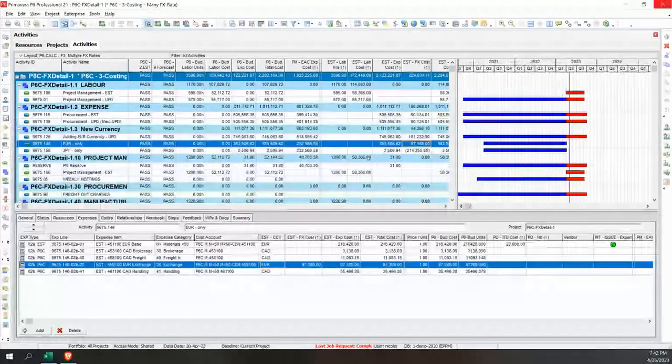So this is where this can become really important, because we know with expenses, you're either going to pay at the beginning, pay a bit during the time, or pay at the end. And we can control that on each of the lines. So things like freight, brokerage, it depends on how you set your activity up, but it would be when you're about to receive, so typically at the front.